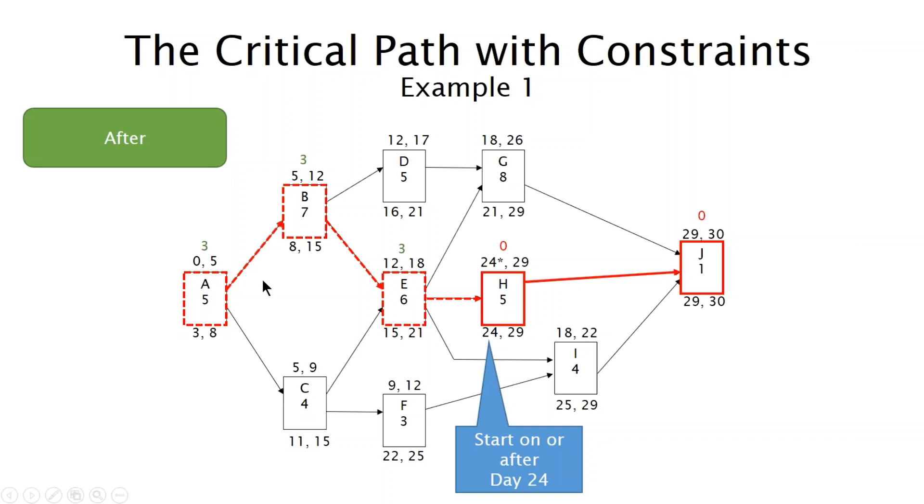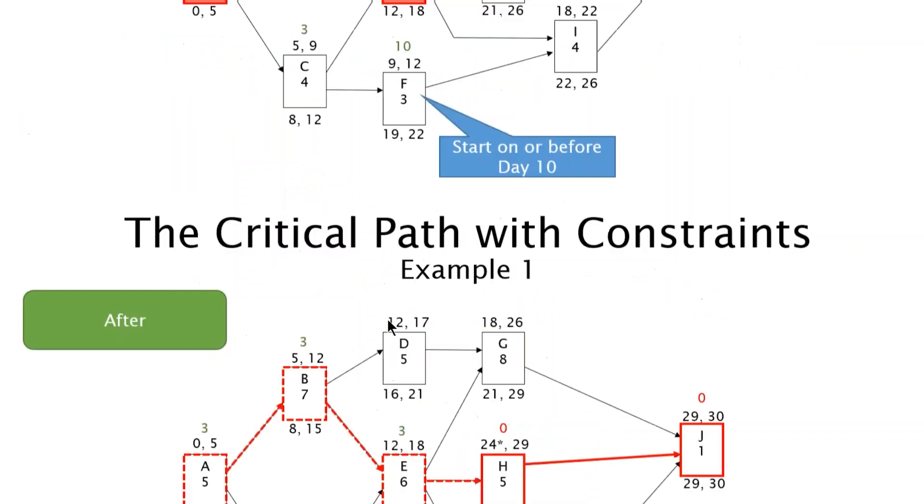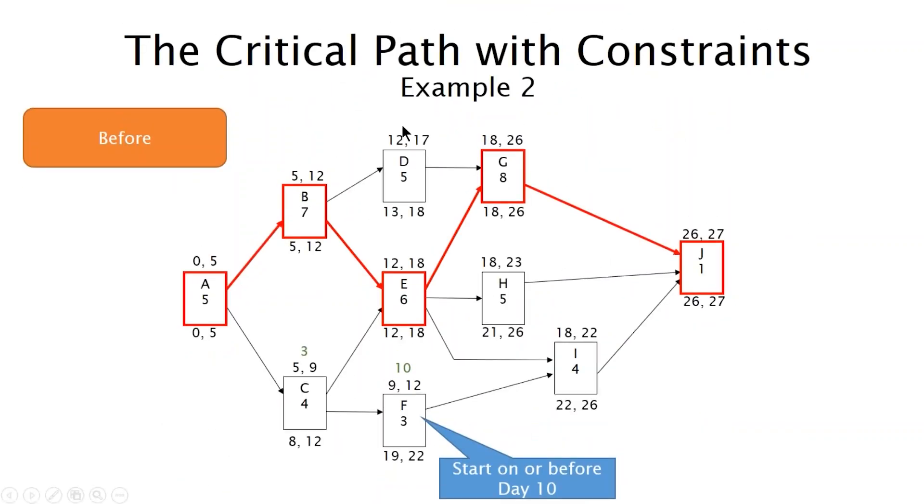Now let's look at, oh there we go, I have the total float values up there on the screen now. So 0, 0 for H and J. And A, B and E have positive three days. We'll do one more example, second example.